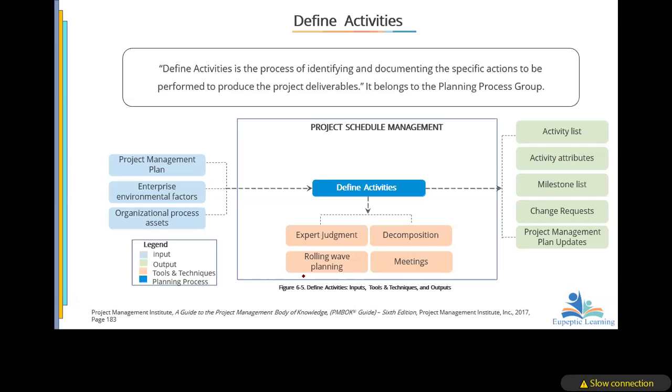We said rolling wave planning is when you plan the near-term ones in detail, and the other ones, maybe you do at a high level. Once you're approaching them, you sit down and do those in detail. So, depending on the type of project, you may implement this. It is a tool. It's not every time that you use all the tools. Exactly.